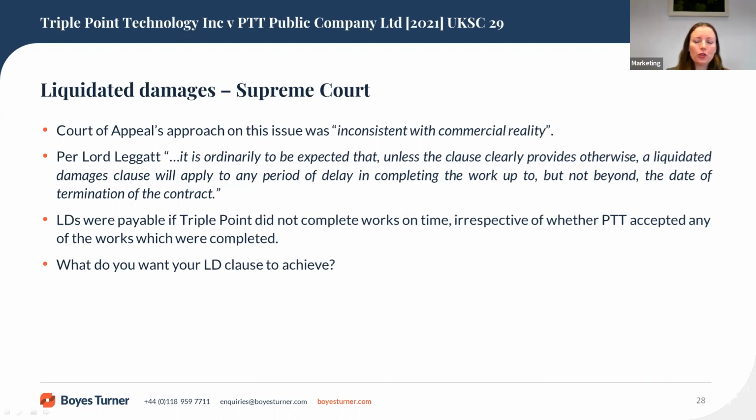Lady Arden said that the true construction of the liquidated damages clause was that damages were payable in the event that TriplePoint did not complete the works on time, irrespective of whether PTT accepted any of the works which were completed. To conclude that there would be no liquidated damages if there was no acceptance of the completed works would render the clause of little value in a commercial context, and she described the Court of Appeal's interpretation as throwing the baby out with the bathwater.